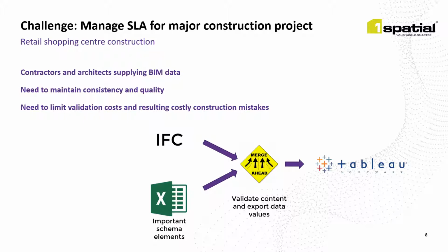It was these drawing files, and in particular the building information models, or BIM, that would control the progress of the construction and determine what got built, using what components. Up until our involvement, the firm did a manual QA and QC of approximately 50 building information models a week in order to keep the construction on track. But they had no way of auditing the quality of what they were receiving. Plus, they could only manually check about 10% of the data.